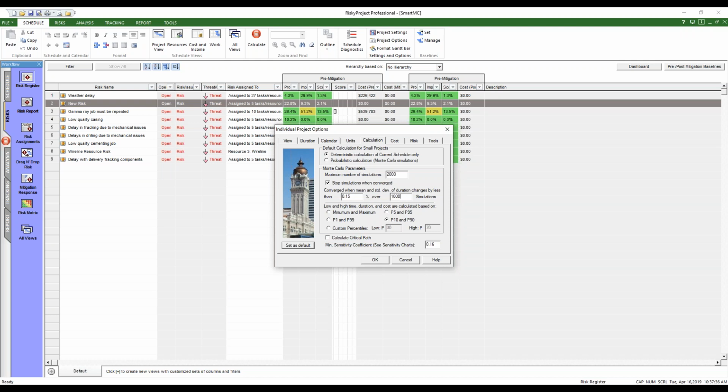At the default settings, we find that most schedules, regardless of their size, are going to converge between 350 and 600 iterations. So this will actually probably push it out to maybe up to about 700 or 800. We can see if we run a quick test on this.